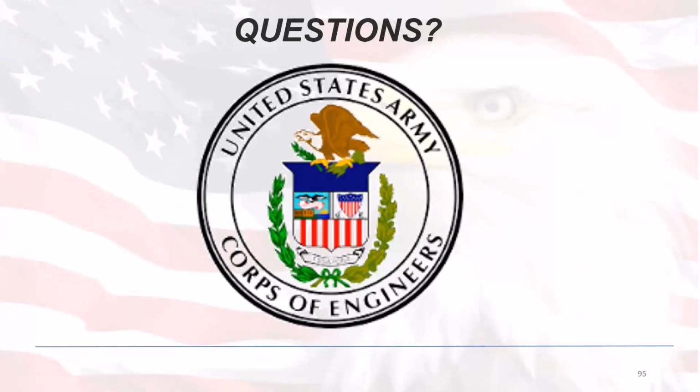Right now, Primavera 6 is one of the ones that we support officially. So Primavera will pop out an SDEF.txt file. RMS will import that. Anything outside of that is not supported by RMS, and we can't officially recommend it. But as long as you get the exact SDEF.txt file format, then RMS will ingest that and put it into the contract.